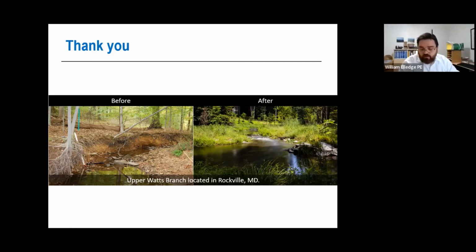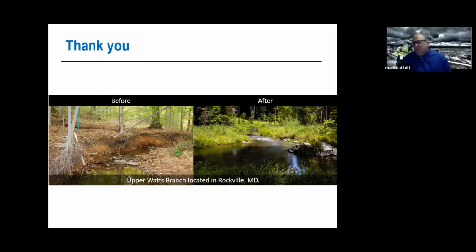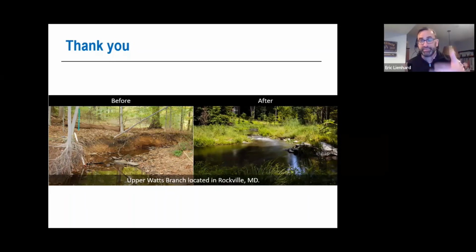As Marjorie was saying, to be honest, I'm not sure I remember the detail on that from the design. So yes, Marjorie, the original thought was there was going to be an overlook there, and years ago when that slope had failed, both the ANC and DDOT had turned to DC Water and said, you guys are going to be here next year constructing Soapstone. Can you take care of this area as well? Well, we weren't there the next year, or the next year after that. So DDOT came in and redid that sidewalk in that area and put in a curb. There are some weep holes, I think, in that curb to allow some of the storm water to flow out. And I know that both those barricades are still there. So that work had actually been taken out of this project because the need had changed.